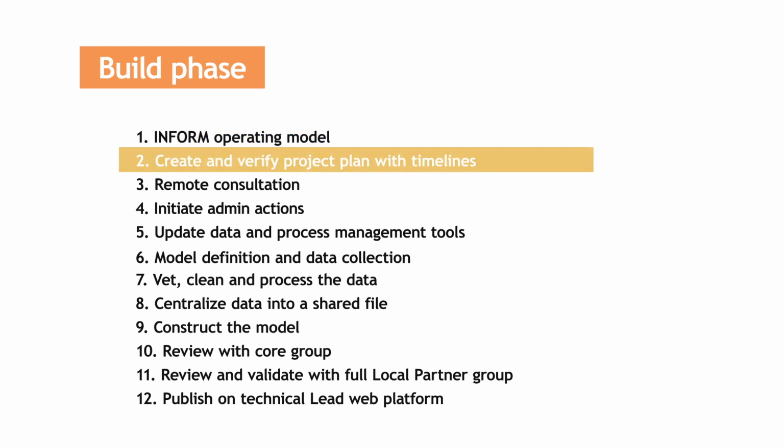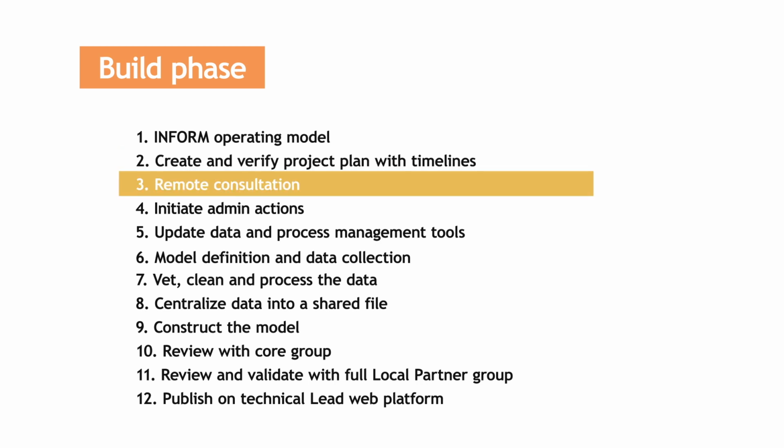Number 2, the project plan and timelines. The project manager creates a concept note and a detailed project plan that includes timelines, stakeholder responsibilities, and milestones. The project manager shares this project plan with the local lead and partners, as well as global partners for their awareness and support.